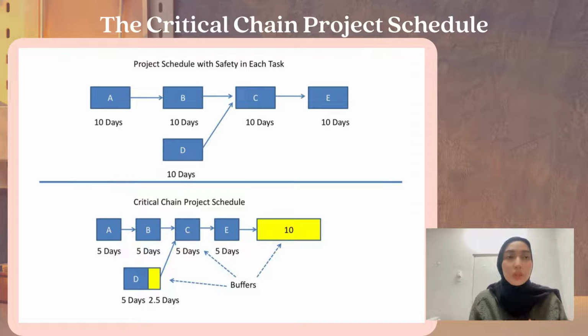So in CCPM, the critical parts are similar, but it takes more of a project portfolio view that requires everyone to understand that each task has a 50% chance of being completed as scheduled. So about half of the tasks will be late. Instead of a penalty for being late, a bonus or other incentive for completing tasks early may be needed.